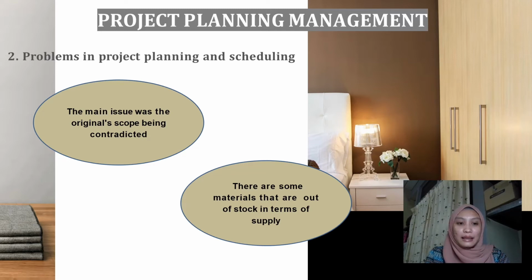The contractor and the consultant or client have evaluated the modification in the scope of work in terms of contract price. The consultant and the client chose to use the original scope of work, RC slab, as a result of the review and after figuring out the best strategy to tackle the problem. As a result, the consultant or client must submit the updated construction drawing once more.